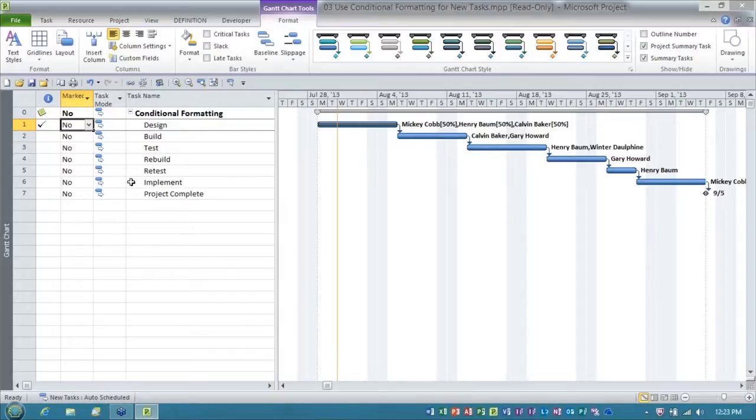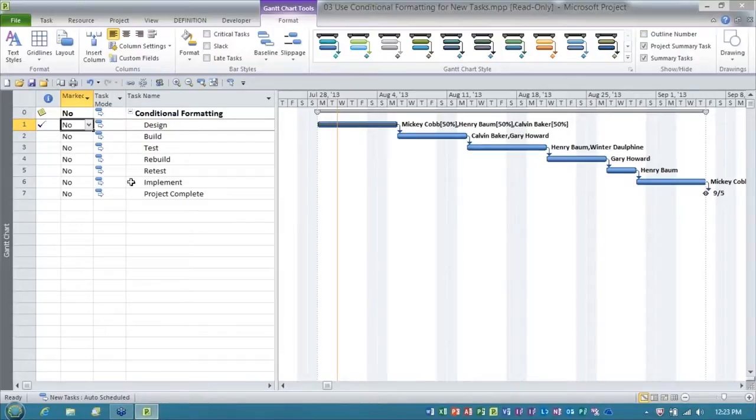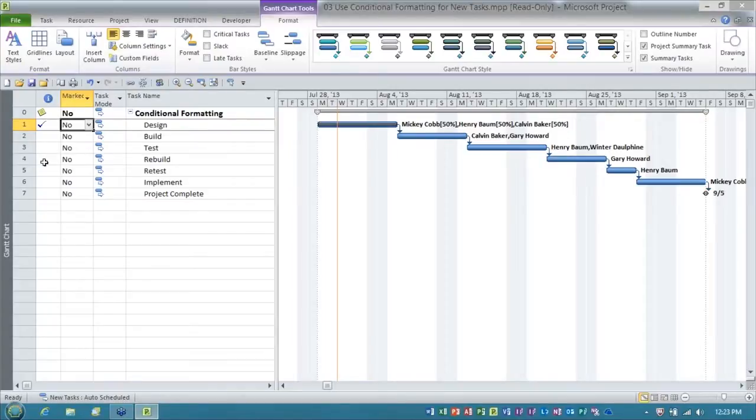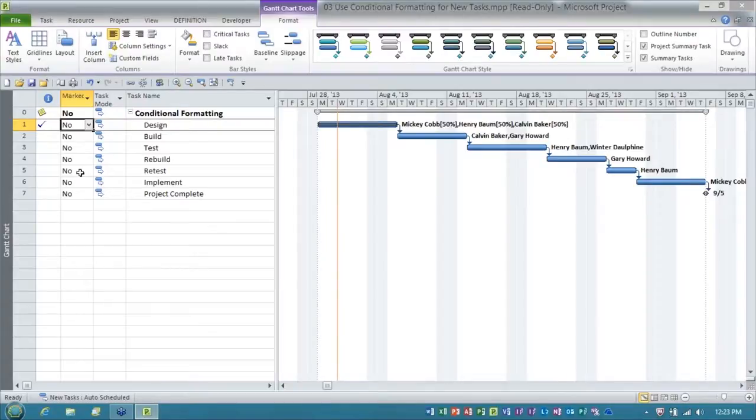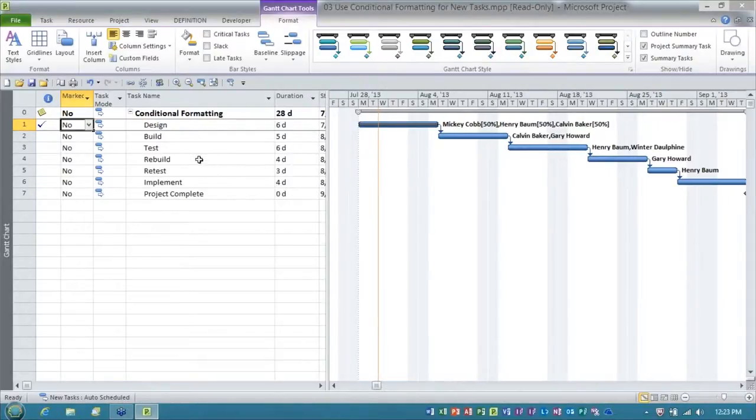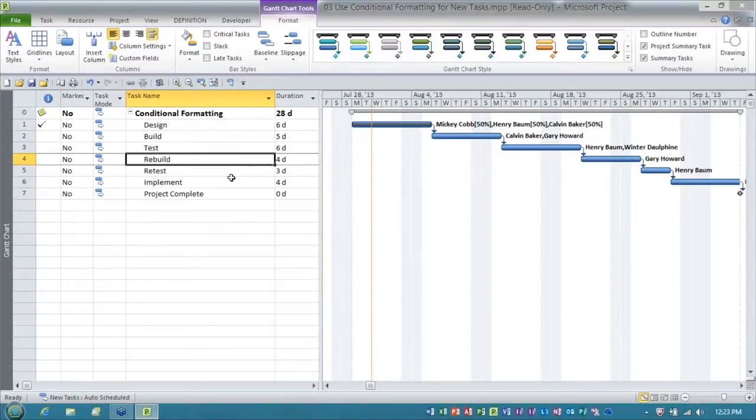Now, what is the marked column? It is a default field that you can use for any purpose you want. And then you can tie conditional formatting to it to get tasks to show up that are marked. I have actually used this in real projects when I needed to be able to mark some tasks for further review. So I did the format text styles, made it like a particular color, and then I marked those tasks by choosing a yes value. Now, in our project, we've actually had two new tasks that were added through a change control process.